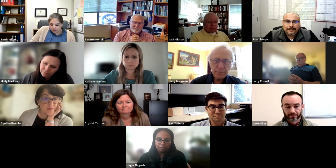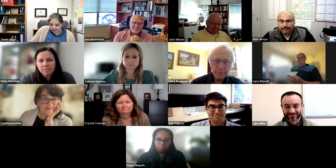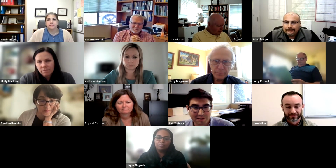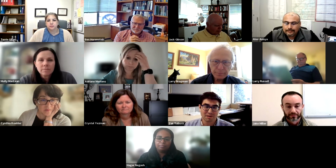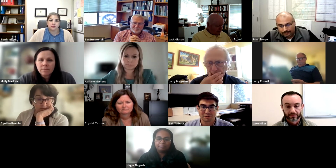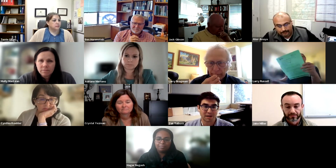All right, well, last but not least, is Zach back at it again, so he'll take this item for Barber Avenue. Go ahead, Zach. Hi, good morning again. I'm here to present the Barber Avenue Pipeline Replacement Project. The project will be constructed in the town of San Anselmo. The project will install approximately 440 linear feet of welded steel pipe to replace a 120-year-old galvanized threaded pipe.